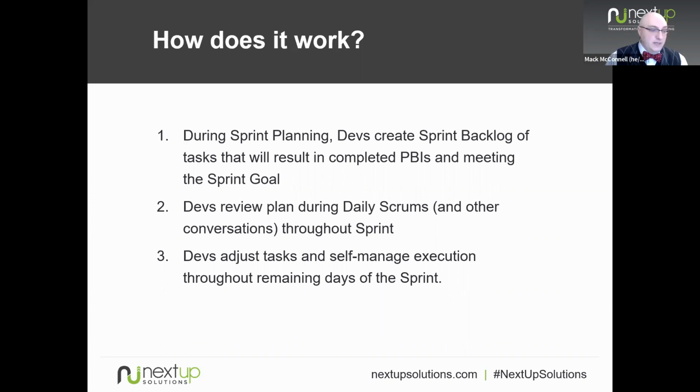In fact, most teams will have an even more strict rule than that, like things that would take less than half a day. So they work together to break all of those backlog items down into tasks. That's them figuring out the how stuff.